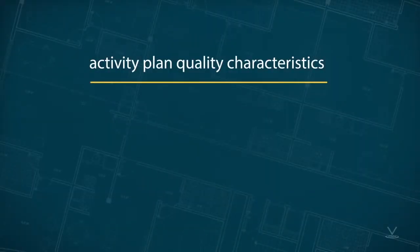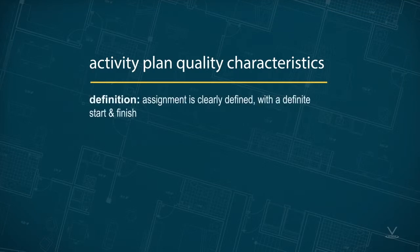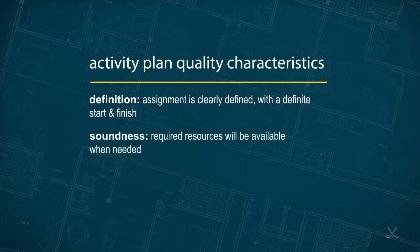Activity planning is much more likely to be reliable if the plan exhibits four quality characteristics. Definition: the assignment is clearly defined with a definite start and finish. Soundness: all required resources will be available when needed.